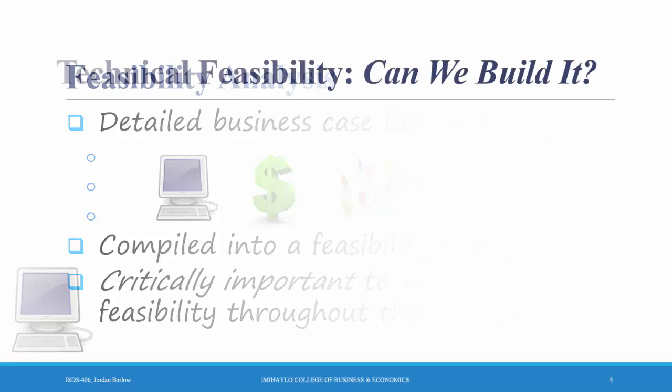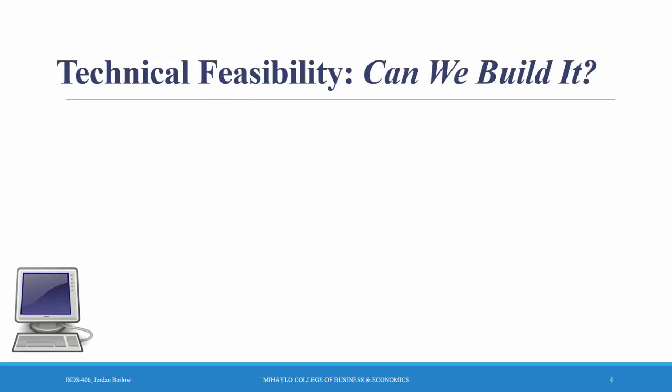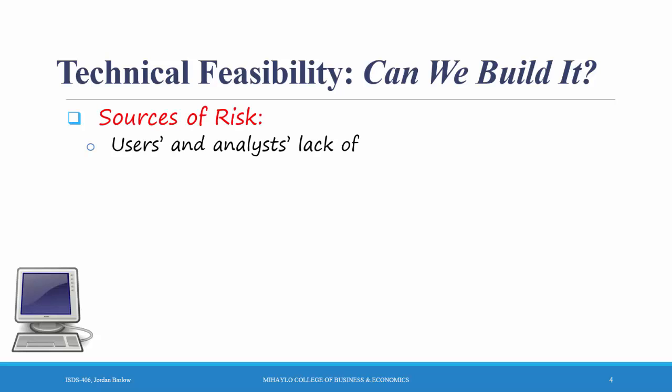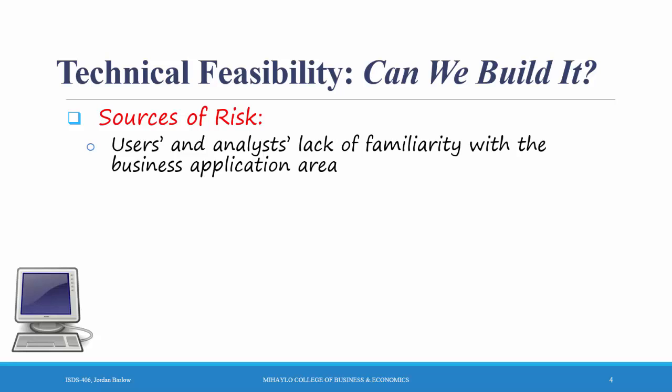First, let's talk about technical feasibility. In other words, can we actually build this system? There are several sources of risk associated with technical feasibility. First, users and analysts' lack of familiarity with the business application area.